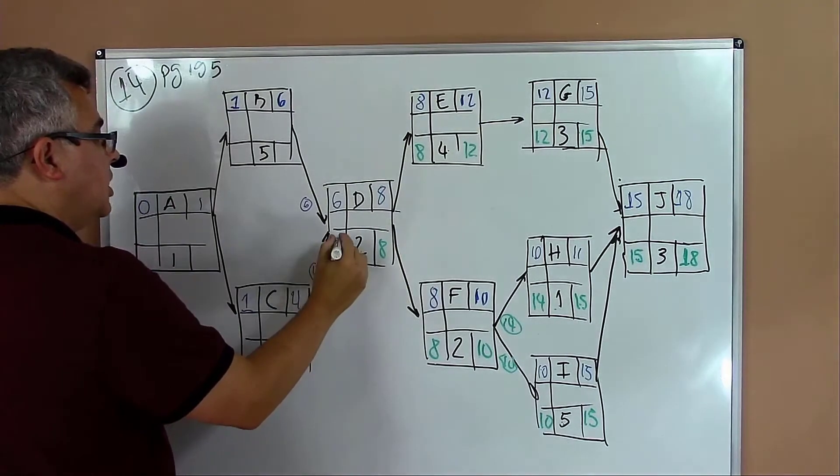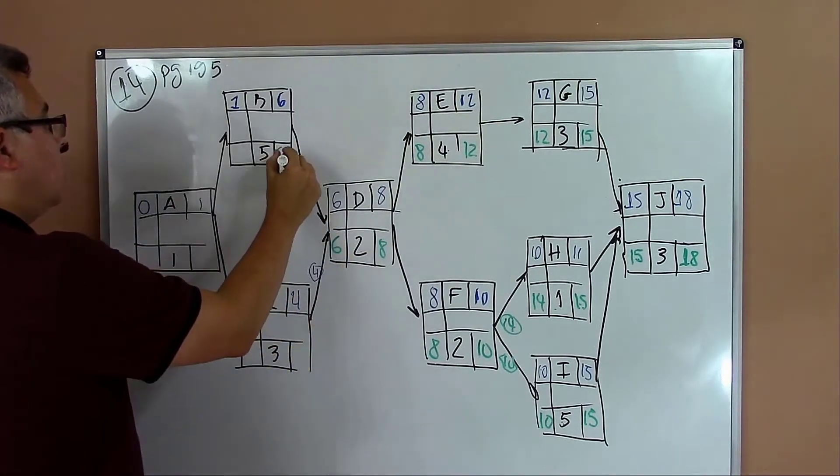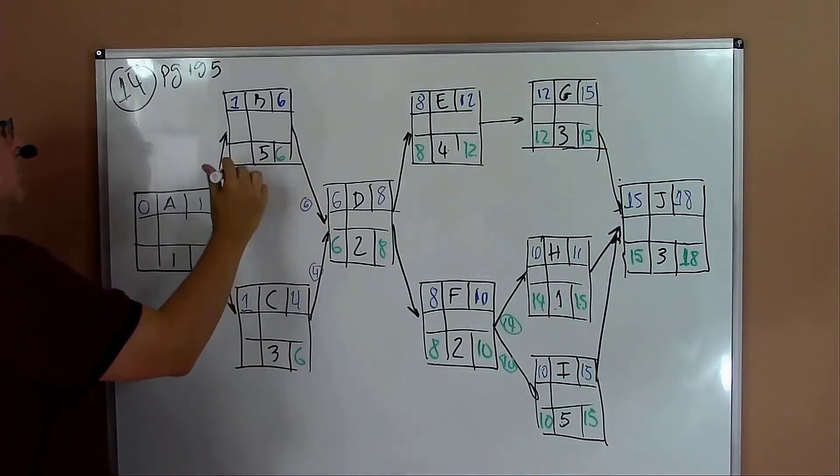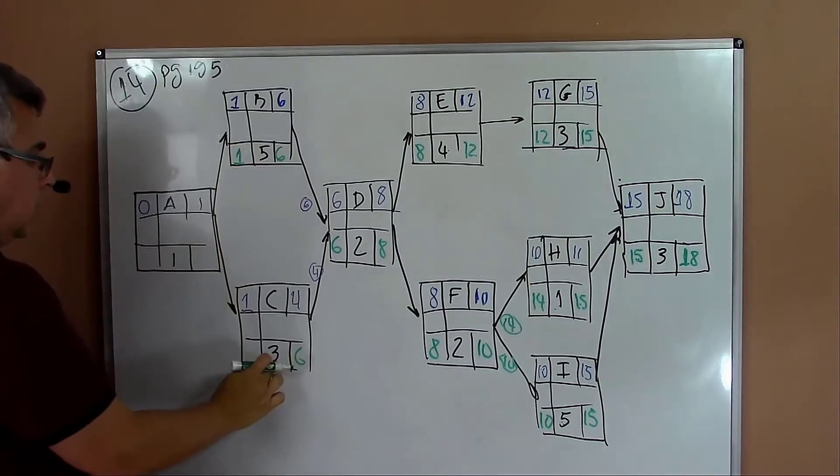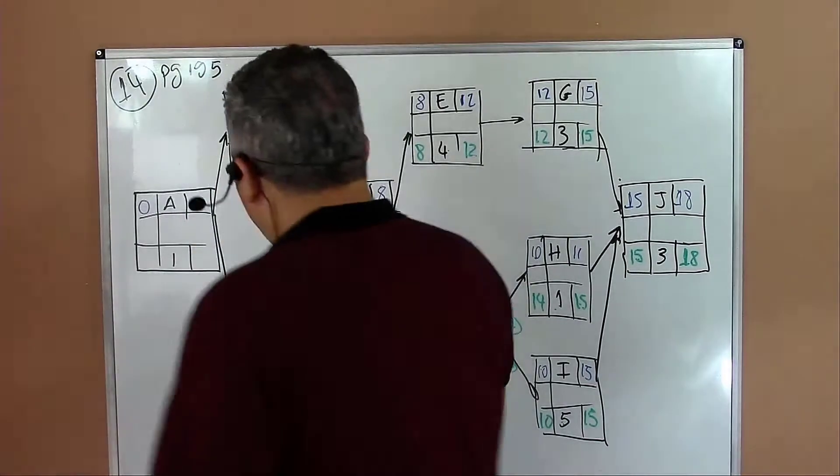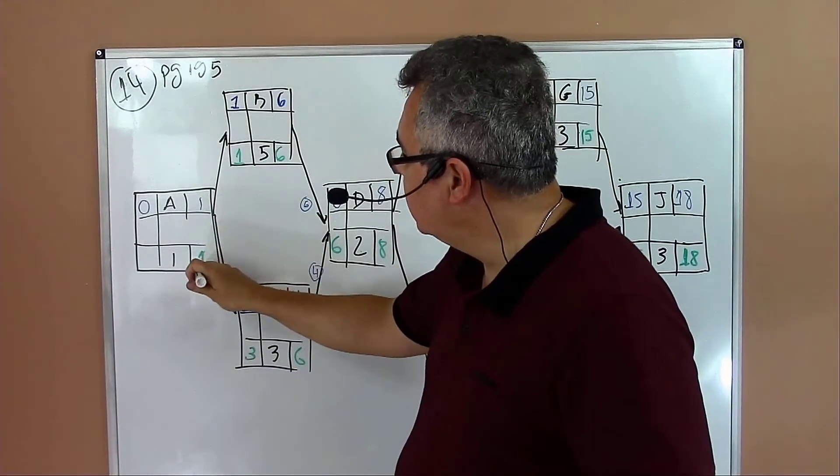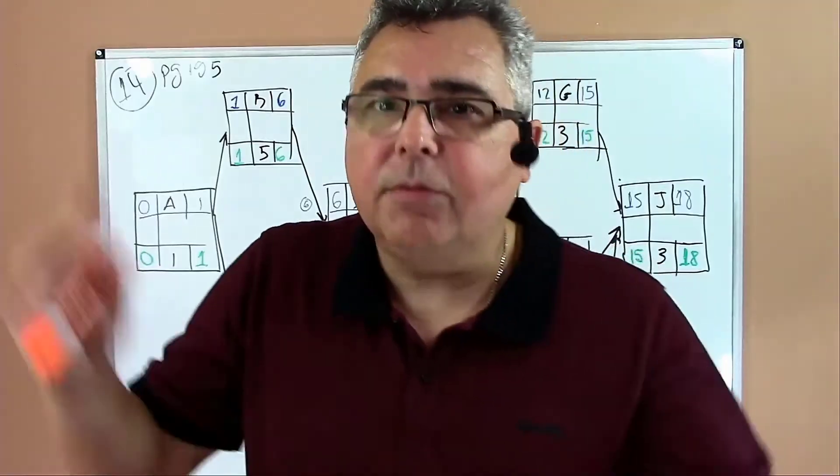Now we have two eights, so it should be eight. Eight minus two equals six, and I move six here and here. For activity B it will be six minus five equals one. Six minus three equals three. Now we have three and one. Because it's a backward path, we should pick the lowest number, which is one.